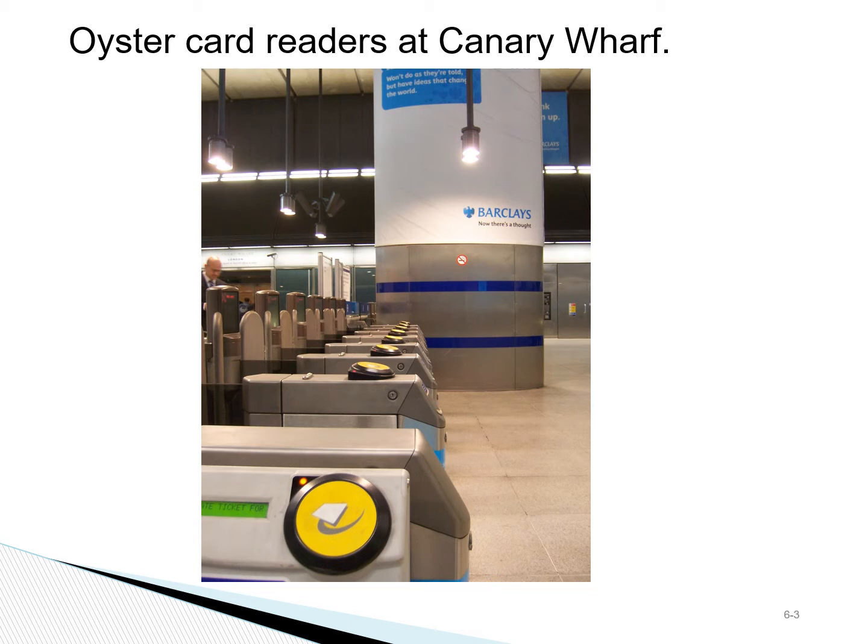Big bang approach would be if they implemented this system throughout the subway and bus system overnight or over a weekend, but they found that to be very risky, and they chose an approach based on a slow rollout. So they chose various phases, starting with small stations and moving on to larger ones. And they even chose to pilot the system in a mock-up train station.